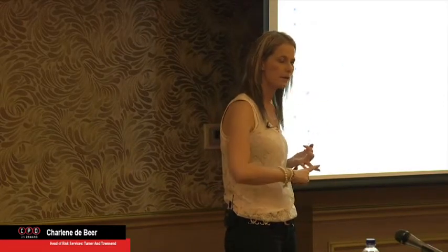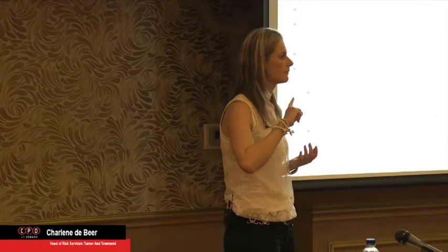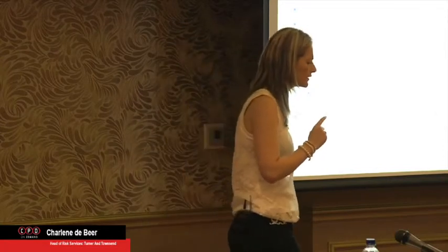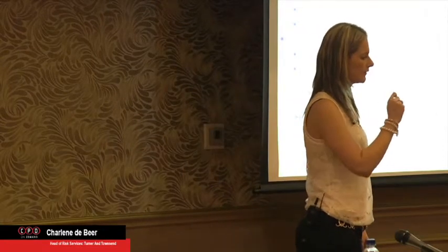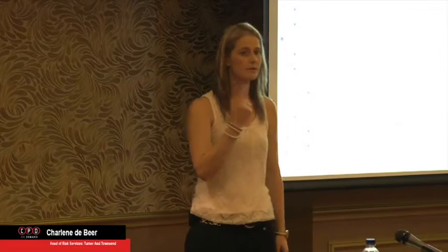Now 40 weeks, I told you, was only for the works. Go out for 3 quotes, place an order, etc., arrive on site. Now there are things we can do. We can put in spool pieces, cotton reels, so we won't let the flushing and the hydro testing stand. But we must remember a spool piece is designed on a drawing as well. So if we don't design enough spool pieces, some of those pipes we won't be able to hydro test.